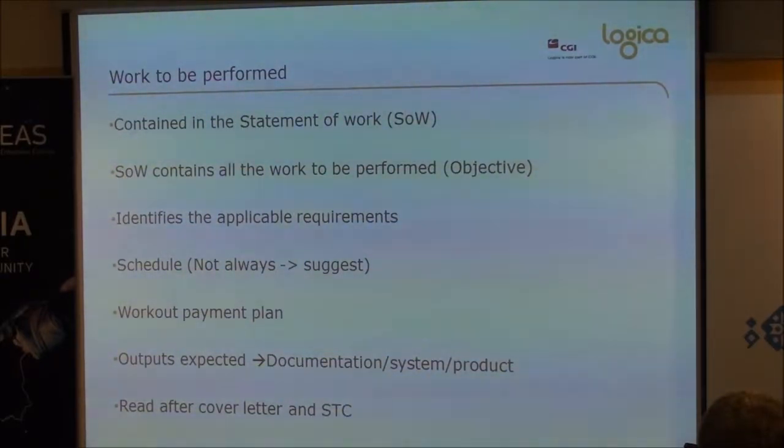And this is essentially what work you're going to need to do during the project period. Now, in a PECS proposal, this will probably be constructed often by you, because this is your opportunity. They'll give you a general statement of work, as in, we'll expect this, this and this, but they don't know what the opportunity is. So you'll have to construct, in essence, the tasks, how you think it needs to be broken down. That'll be a job for you. They're not going to dictate that in this case. You will have to do that.